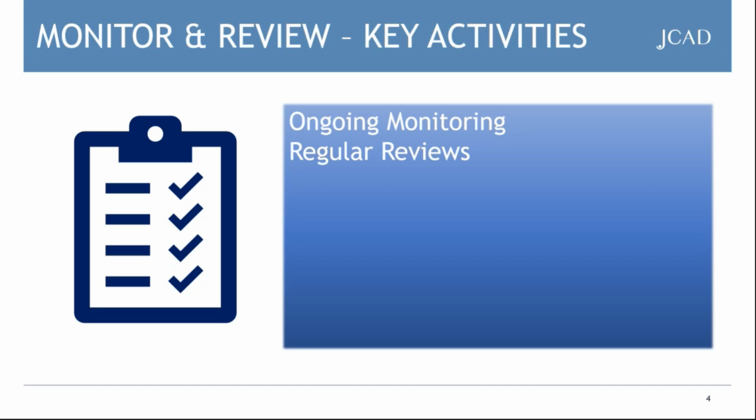Conducting planned reviews on your risk registers, your risk assessments, and your treatment plans at specific intervals. It might be monthly or quarterly, some risks are annually, or even when significant changes occur, you might want to go back and have a look at your risks then. You should be reviewing your risk assessments and treatment plans in response to any specific event, such as an accident or a near miss, any significant changes within the organisation, or the introduction of new technologies or changes in the external environment.